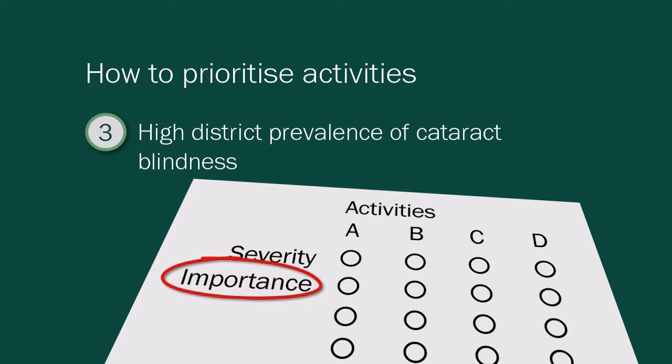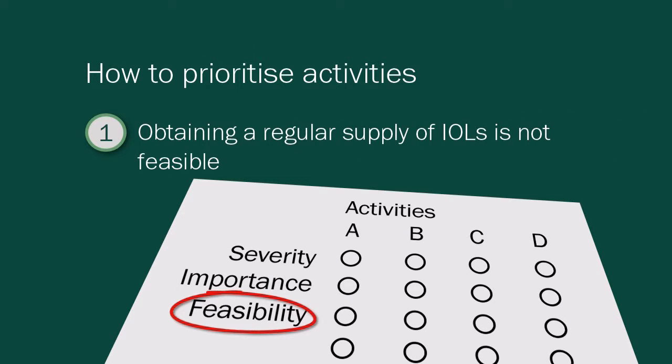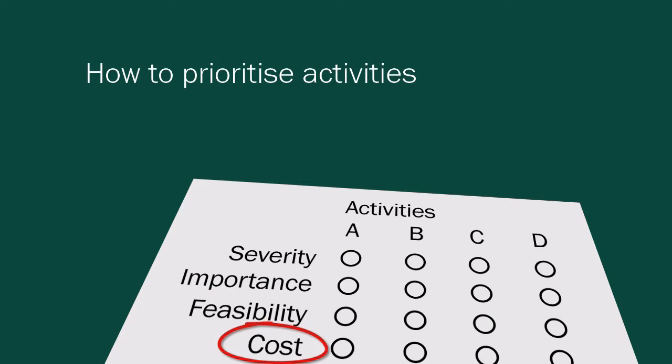Feasibility: when scoring this category, planners should ask themselves the question — is it possible to make the change with the available resources, or are additional resources required? For example, if a planner applies a score of one to an activity to obtain a regular supply of intraocular lenses, this implies that this is not a feasible activity for this plan.